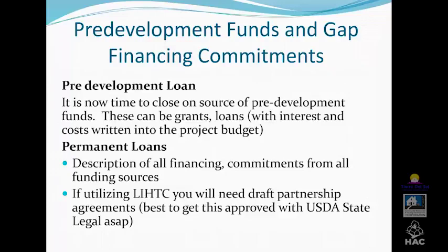First thing you're going to want to do is obtain a copy of the title commitment, and this is from a local title company, and everything has handbooks and instructions for it, so again, your TA provider can help you with that. On a title commitment, there will be requirements that are necessary for everything to be done on those requirements so that the title company can provide the title insurance policy.